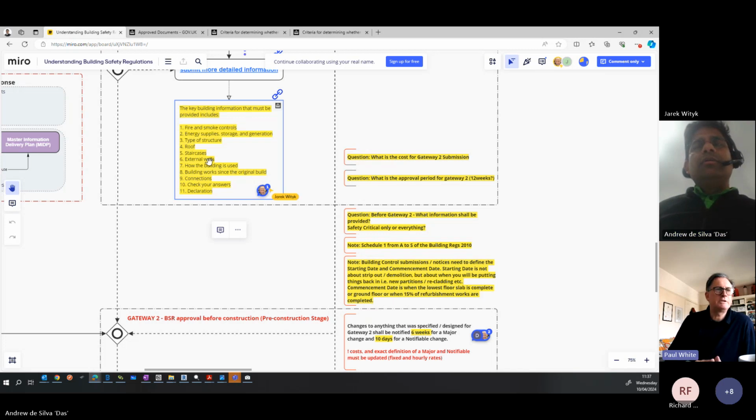And certainly, for instance, there are issues with the penetration seals, even with pipes and cables. If they're in the wrong place, the holes are the wrong size, and you don't know through which compartment construction they're going through, I think we probably need to have that, because you can't then select some of the penetration seals for pipes and cables.